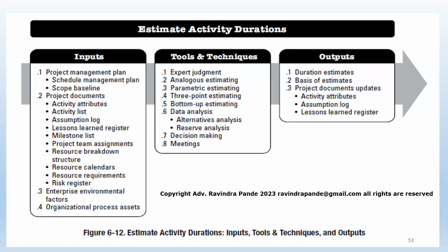Or the same thing: activity, schedule, and resources give me the exact cost, which will be applied on a task-level basis. Then I have the resource breakdown structure. I might categorize my resources as developer, team lead, tester, verification, validation, release engineer, and so forth. Even in car factories or any other projects, I normally build a kind of resource breakdown structure where I create a hierarchy of different job roles for the resources who started working with me. And then I might have a resource calendar.